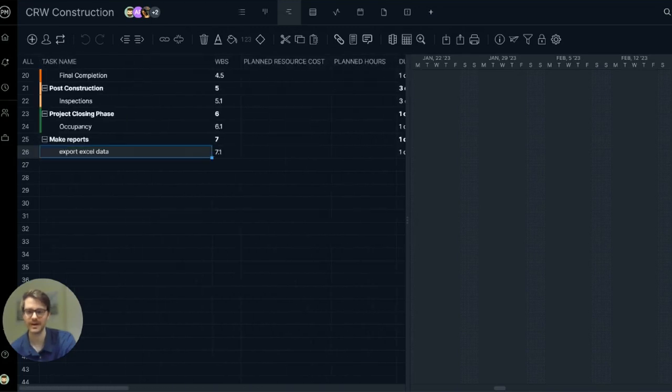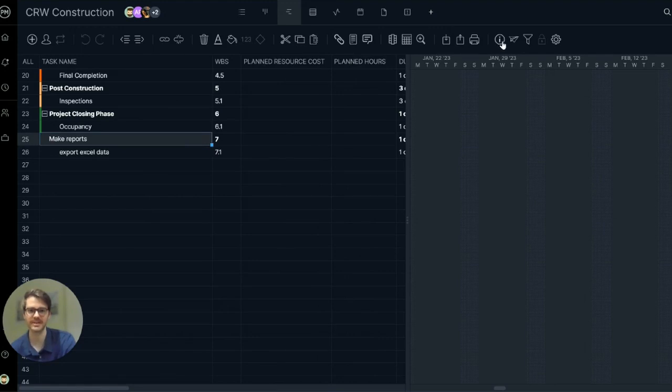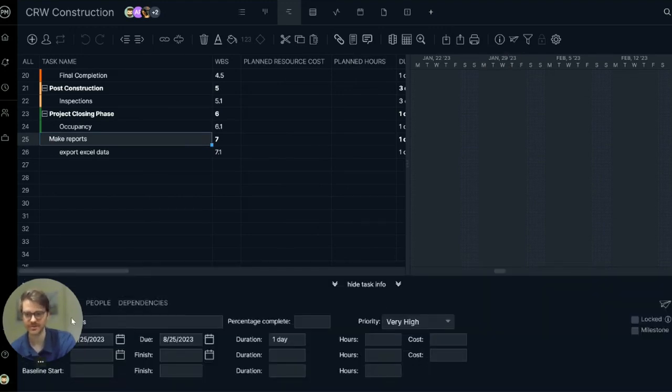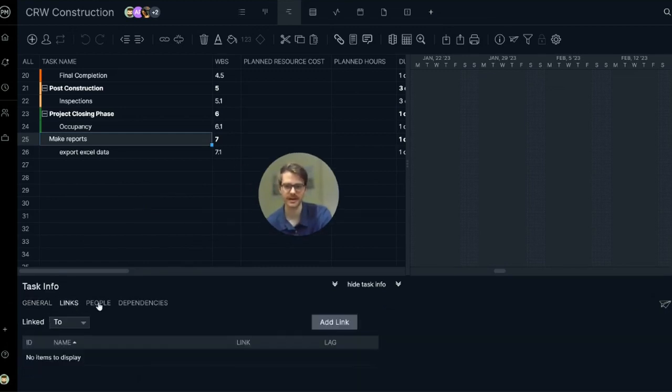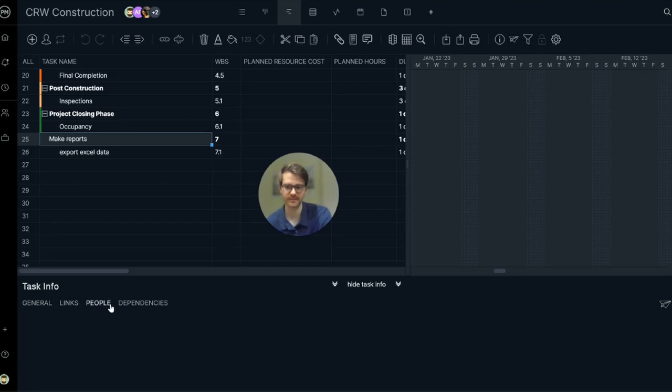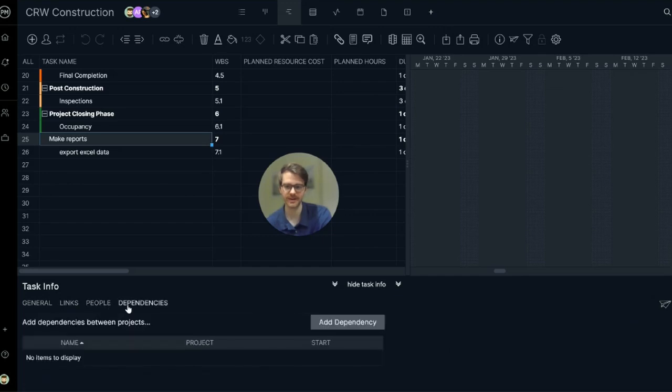If you want even more task information, you can click the eye on the tools, tool ribbon here. And there's a tray of some in-depth details about plan start, actual finish, links, people involved, and any dependencies you may have.